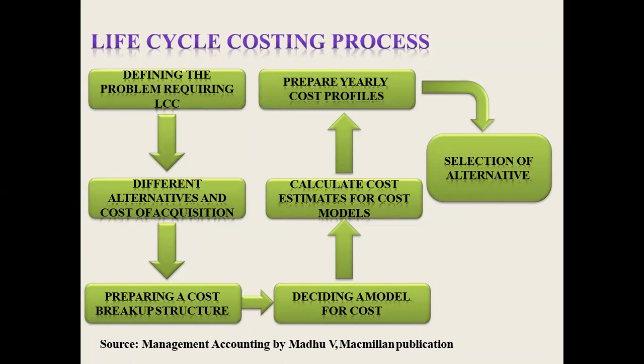Or if you look from the contractor's point of view, foundation work is going on, how much cost is required. Okay, then the building starts, after foundation for column and beam, how much cost is required. For lintel level work, how much cost is required. For sidewall purpose, how much cost is required.